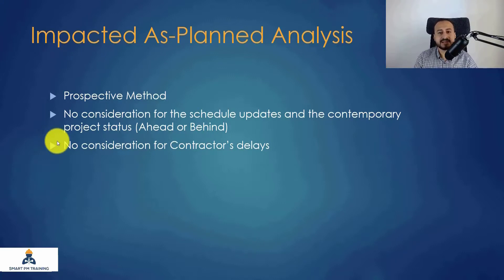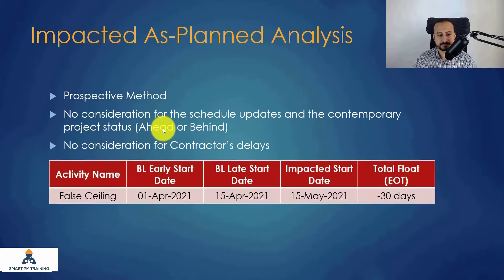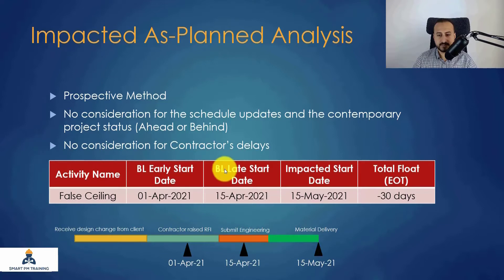The Impacted as Planned analysis is biased against the client — the contractor will only show the client delay and will not take into consideration the contemporary records. That is why it is a weak method. I do not recommend it. It is the second most popular method after the Time Impact Analysis.